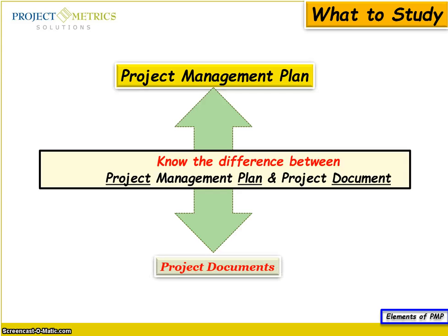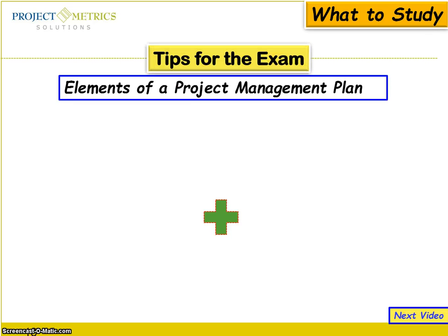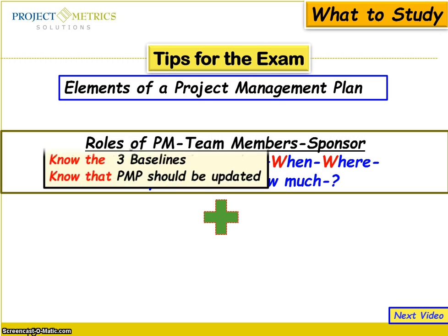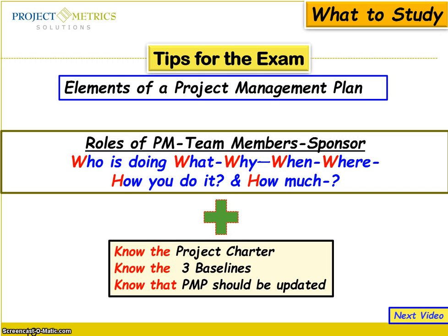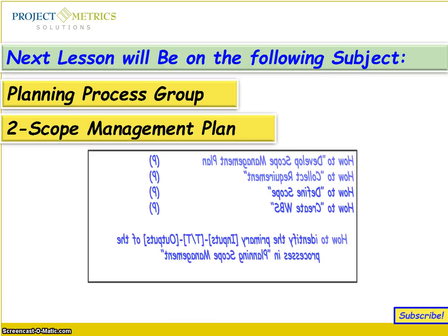I'd also like you to make the difference between the project management plan and the project documents. Don't forget that the content of the project management plan includes roles and responsibilities: who is doing what, why, when, and where, how you do it, and how much. So this is the guideline. Of course, in the project management plan you find the project charter and the 3 baselines, and from time to time you update your project management plan.